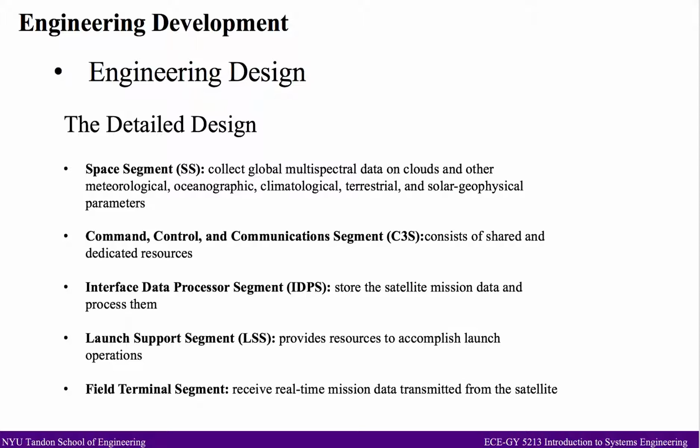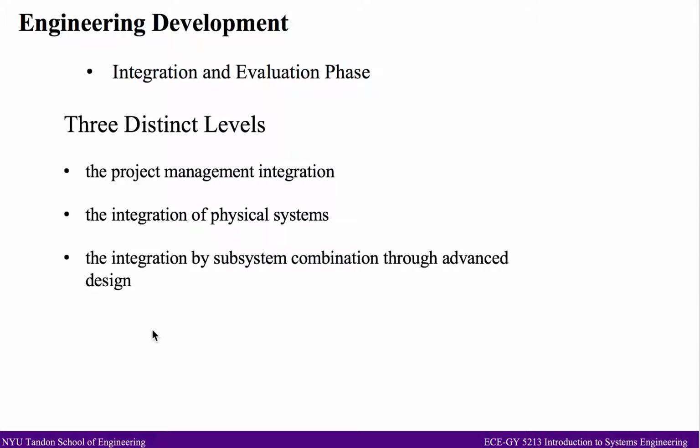So, after knowing the details of the design, let's look at the integration. At this stage, bidding contractors develop a proposal which contains an integrated master plan, known as IMP, and an integrated master schedule, IMS, which outlines the proposed developmental test and evaluation activities.